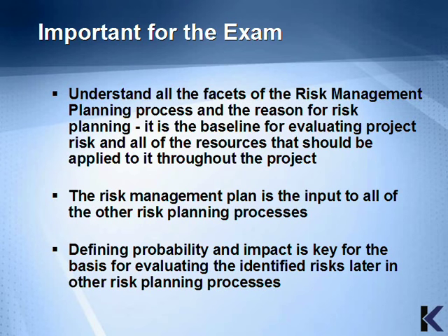This section goes through topics and concepts that are important for the PMP exam. The first item is to make sure that you understand all the facets of the risk management planning process and the reason for risk planning. It's the baseline for evaluating project risk and all of the resources that should be applied to it throughout the project. The risk management plan is the input to all of the other risk planning processes.